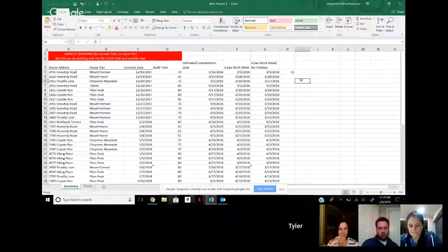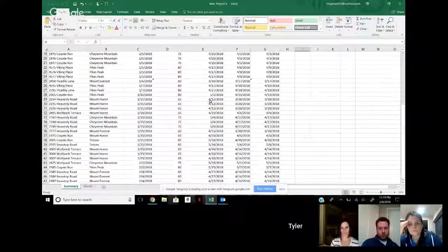Oh, the days saved by working on Saturdays. Yeah, that should be your first calculation. The 6-day work week it's talking about is subtracting your estimated completion date by your 6-day work week. That is what gets you the days saved by working on Saturdays. Okay, cool. All right, well, that's all the questions I have.